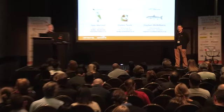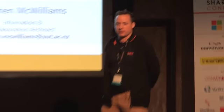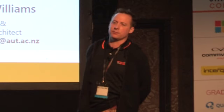We did start very much siloed on the faculty, and then about 6 months in we went, no, actually we need a bigger picture here. So we backtracked and started writing content management strategies and information management policies. All that base documentation we realized we didn't really have. So we stopped and started writing that stuff. And then we came back and went, right, now we're ready to do the faculty.